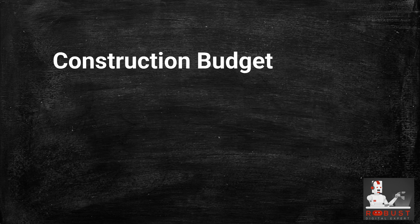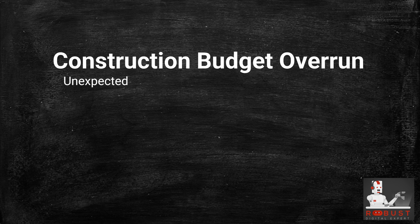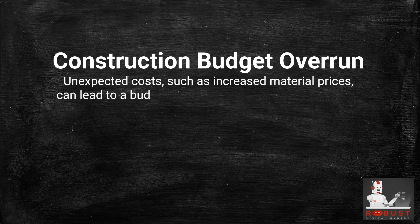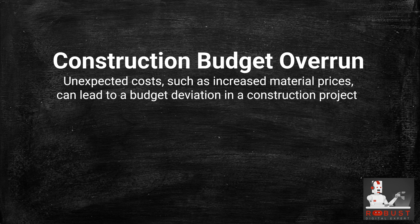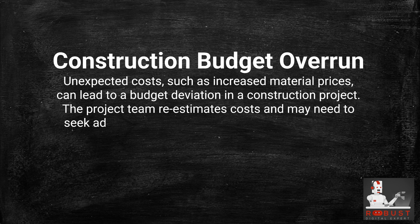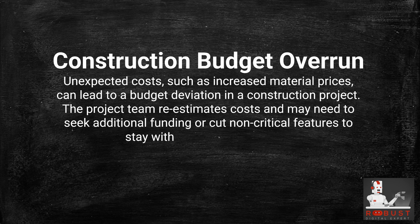Construction Budget Overrun: Unexpected costs, such as increased material prices, can lead to a budget deviation in a construction project. The project team re-estimates costs and may need to seek additional funding or cut non-critical features to stay within the revised budget.